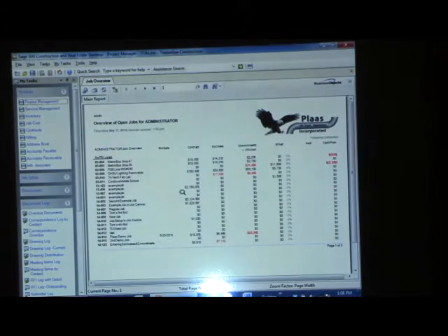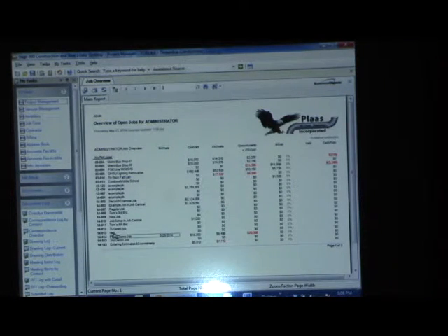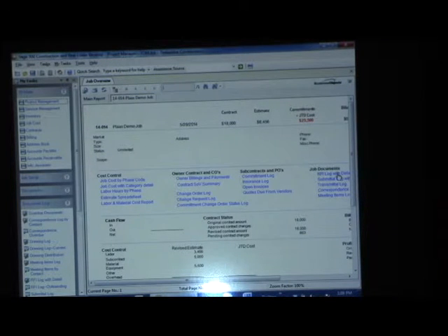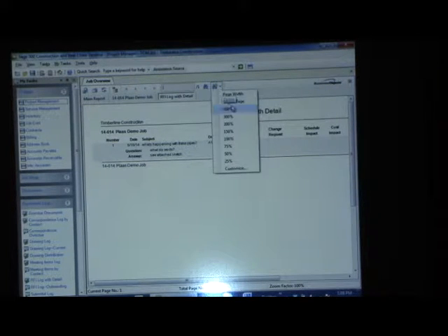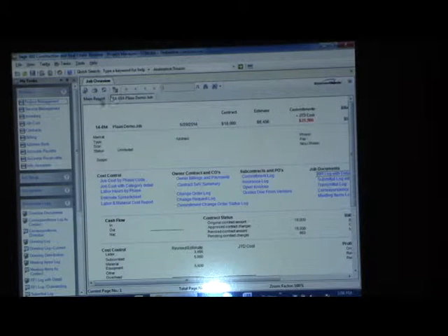But the idea is you are dealing with each individual RFI, and then when you want an RFI log, you say, give me the RFI log. So it's not like you're updating the RFI and then going to update the log to reflect the status. It sort of builds the log on the fly based on what the status is for each RFI. So it will keep track of what are all the RFIs, what is the status of each, what were the dates, so you can build that log anytime you want. I like this program more and more. It's good for CYA. Right.